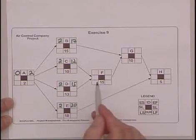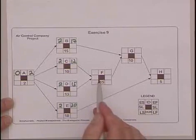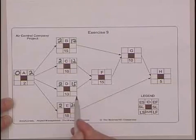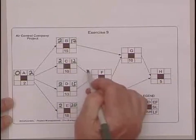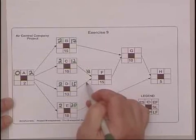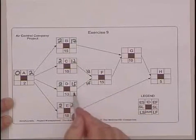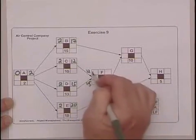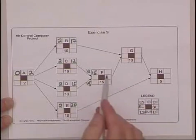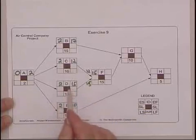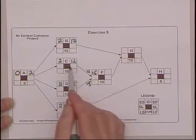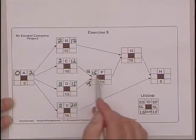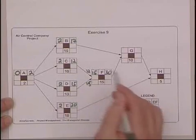Now we move to the next activity and that's F. F is a merge activity, which means there's more than one activity that has to be completed before F can start. And this is where you need to keep in mind choosing the larger number. So we have two early finishes, 12 and 15. We choose the larger number, which is 15, because F can't start until both C and D are completed. C is done on the 12th, but D is not until the 15th, so F has to wait until D is done. The earliest it can start then is 15. 15 and 15 is 30.